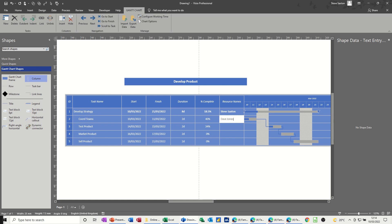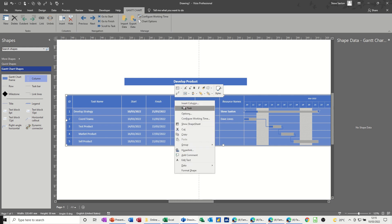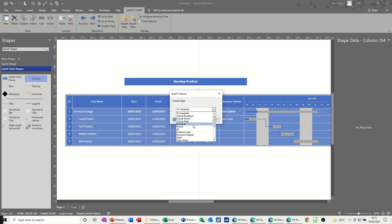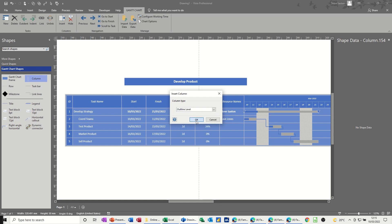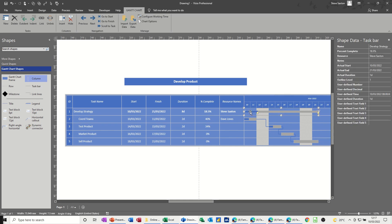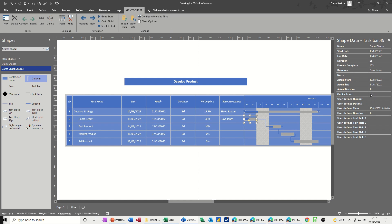And then, if I come back over this side and insert a column and go for the level, you've got the option there, outline level, OK, there we go. Now, I've already put this information in, so you can see how it sits, or you can just use the shape data area to type in the outline level. So what I've done is I've made this top task, develop strategy, outline level one, and then all the other tasks are outline level two, so they're all coming underneath this.